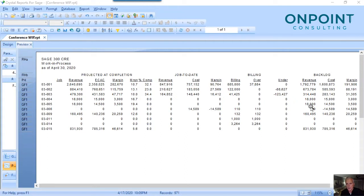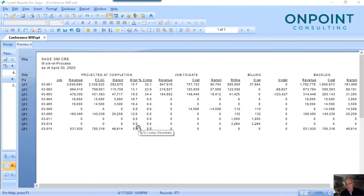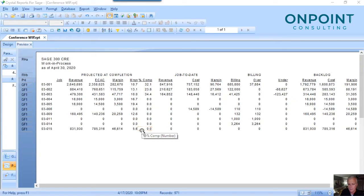The CFO in me comes out when I look at this — my eyes go instantly to the margin. Do we have margin slide on any of our jobs? And if we do, why? Is there a site condition or something happening on the job, or perhaps change orders that aren't coming through? There's always a reason. And sometimes if we catch it soon enough, we can correct.